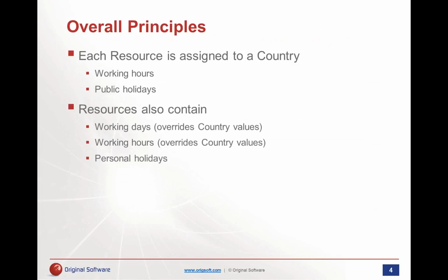Now, in addition to that, a resource will also hold any personal holidays, plus any overrides to the country's values. So, for example, I might just work 3 days a week, 5 hours a day. That can also be built into the system, because the whole principle of resource management is based upon the fact that we know how many hours or even minutes a day each resource can dedicate to a project.